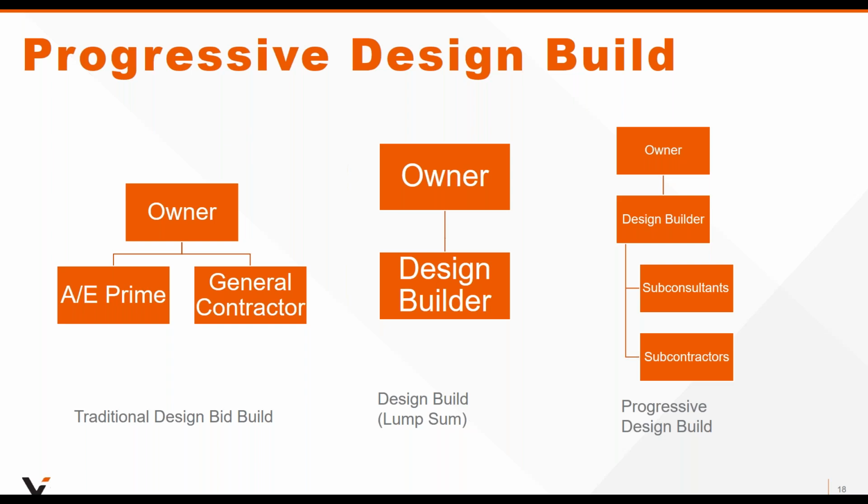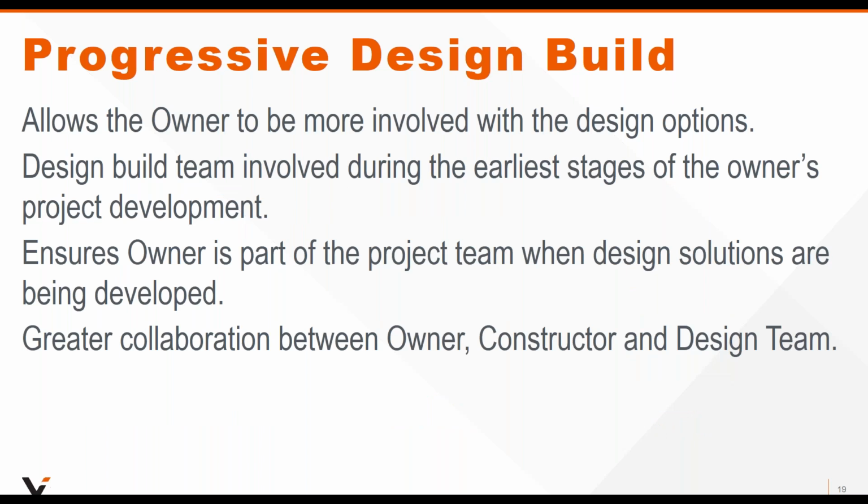You not only have the design builder and the sub consultants and the specialty subcontractors, you also have the owner involved, and this is structured in the relationship. This is intended to address the owner's concern that the design solutions that were being provided to them didn't quite meet their needs because too much had been given over to the design builder in the initial stages. And it allows the owner to be more involved with the design options.